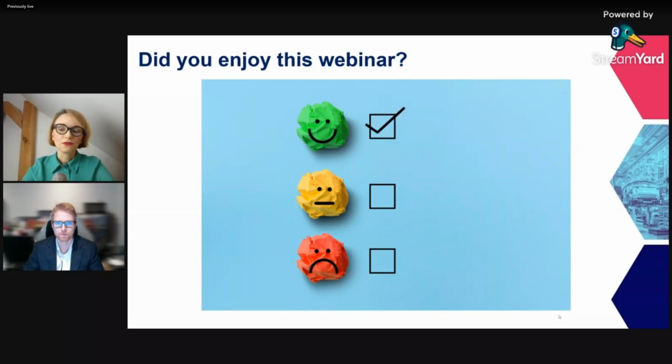For me, generally, I think it is important for you to know that the requirements identification starts when we have the first contact with the customer, even with the request for information. And there is the moment when we can start recognizing the requirements, gathering all of them, to review, to verify if they are acceptable for us, if they are feasible to meet later on the shop floor.